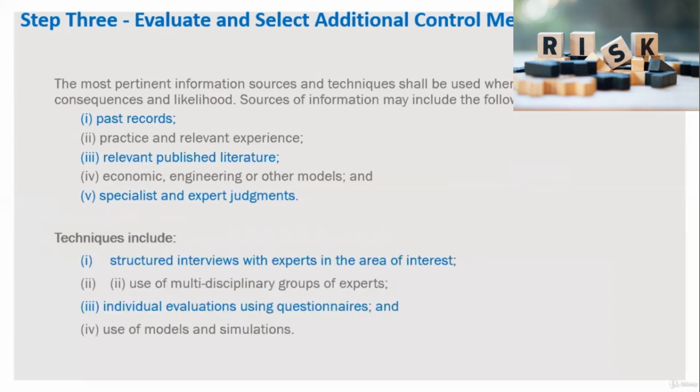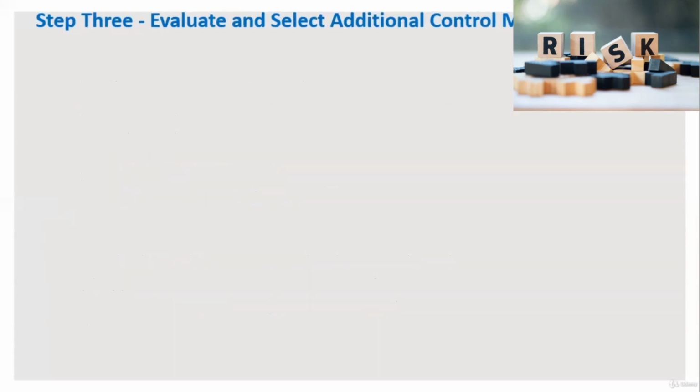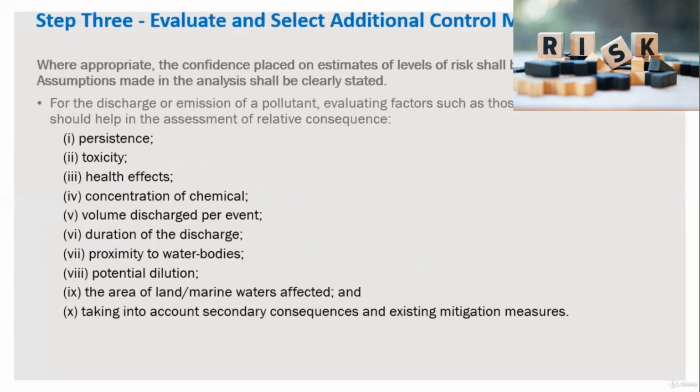Techniques include structured interviews with experts in the area of interest, use of multidisciplinary groups of experts, that is, your specialized people in the departments, individual evaluations using questionnaires, and use of models and simulations, where appropriate. The confidence placed on estimates of levels of risk, the assumptions made, and the analysis shall be clearly stated.